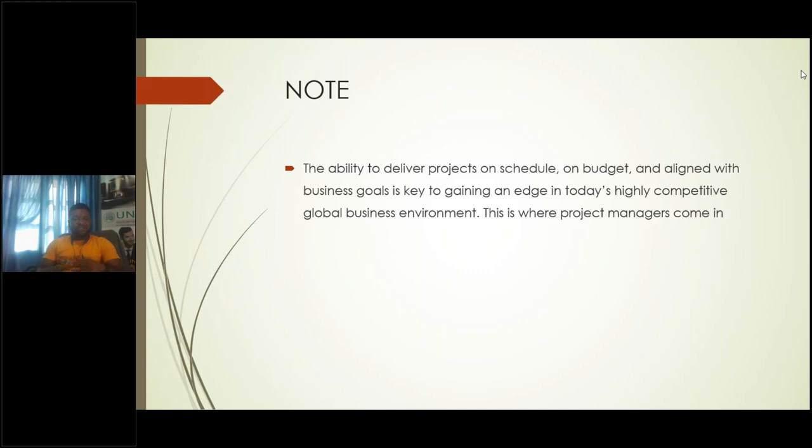And of course, for that to take place, you must activate what we call the change control. Okay, meaning you're asking for a change in the budget because of some unforeseen circumstances. Okay, those also can be an act of God. Okay, maybe natural disaster, like this COVID-19 issue that for most 3 months, all the countries or the country was on lockdown, no activity was going on, and every day passes, there's loss of time, there's loss of money.